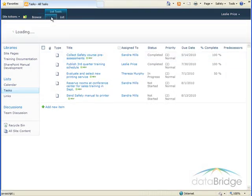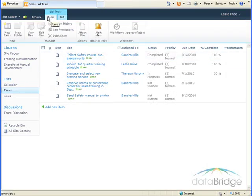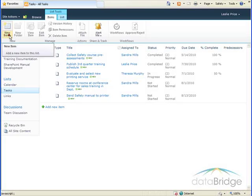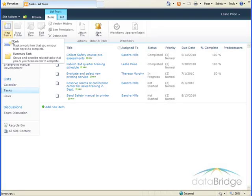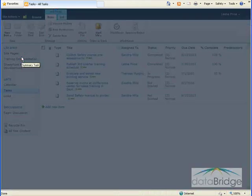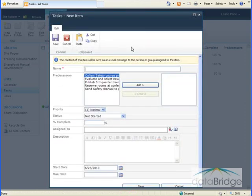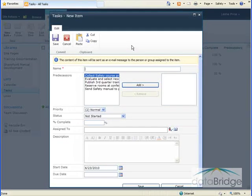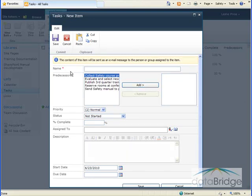So we'll start with creating the main summary task folder. Up in the menu bar, we'll click on Items. And then click the New Item drop-down and select Summary Task. In this example, the primary task is to develop a management training course, which will be broken down into several subtasks. So in the Name field, I enter a name for the summary task, which is Develop Management Training course.